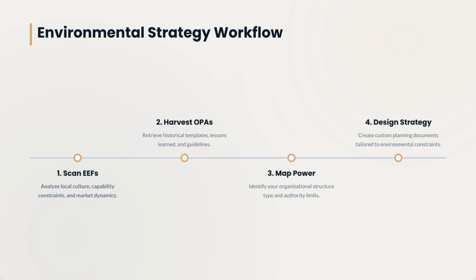Example: a newly hired project manager at a global logistics firm is tasked with upgrading their warehouse software. Instead of launching straight into code, she follows this workflow. She checks local union regulations, which are EEFs, pulls past software installation templates, which are OPAs, identifies her strong matrix authority level, and designs a rollout schedule that perfectly matches the local warehouse shift patterns.